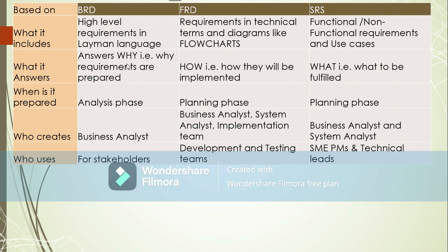And SRS is equally in the planning phase, because all these are in the planning phase, and implementation starts after planning. So once you have planned, you say yes, we will do it. After that, you start with the design and the implementation. So everything needs to be completed before you actually start any kind of implementation, as in designing of the project or coding of the project.